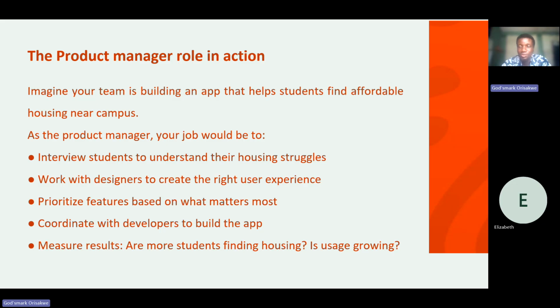Ideas are very easy to get, but to start building them takes a lot of time and effort. Without his level of expertise, he needs more time to research, learn, and make errors and mistakes and finally get it right and build a chat feature for you, whereby the user can chat directly on the app with the landlord or the caretaker. So if I see the skill level of my developer is not up to that expertise yet, I say, okay, let him just build something that will work now while he spends more time building out that chat feature. When that one is ready, we will deploy that one.